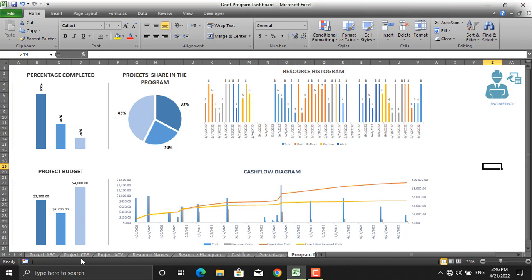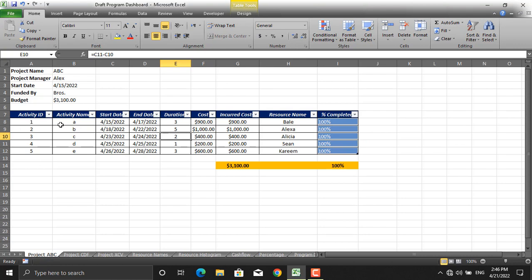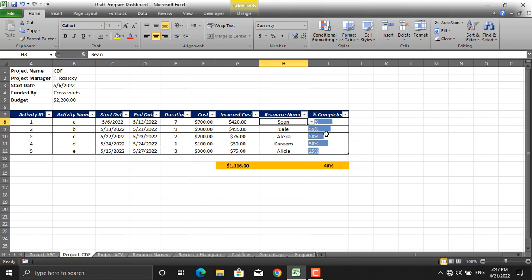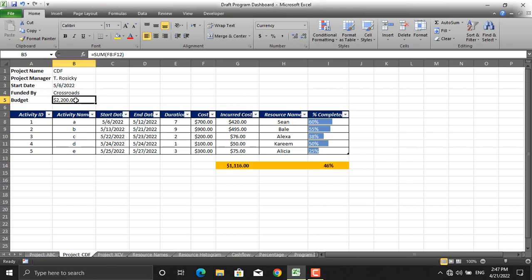As you can see in this Microsoft Excel file, this dashboard represents a program consisting of three different projects, with full details given: activity ID, activity name, start date, end date, duration, cost of each activity, incurred cost to date, resource names, and percentage complete. Besides that, the project manager name, project name, start date, who funded it, the project sponsor, and total budget are given. The same applies for project CDF and project XCV. Different projects have different percentages completed, different incurred costs, and different budget amounts. To see all this information on a single page, we use the project dashboard.